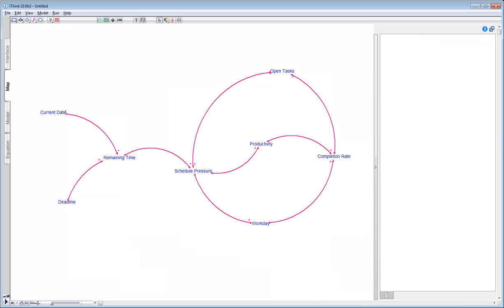What other parts of the system does the schedule pressure affect? One thing we might do when the schedule pressure is high is to add further resources to our project. Schedule pressure may also have an effect on the quality of our work. Though both of these aspects are important and worth investigating, we will not consider these here for now in order to keep the initial model simple. But we should take note of these aspects for future investigations.